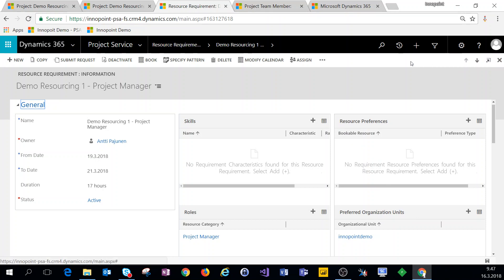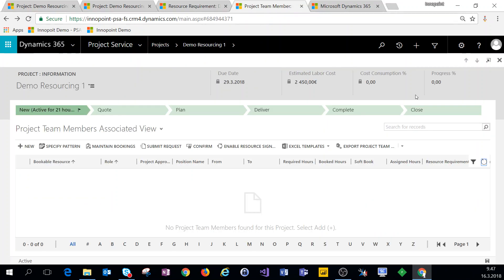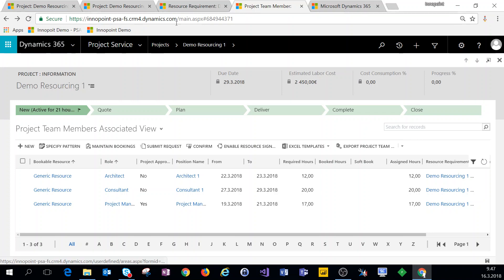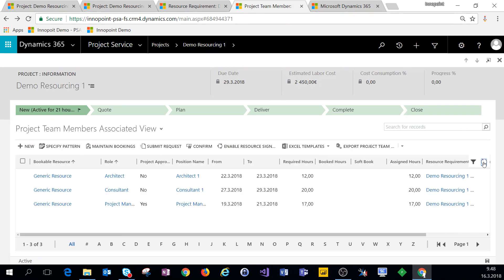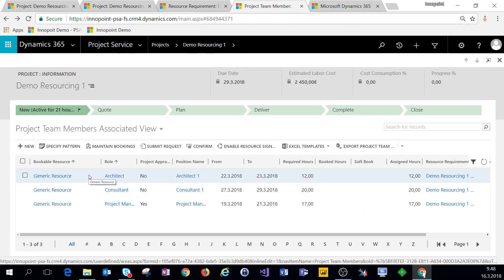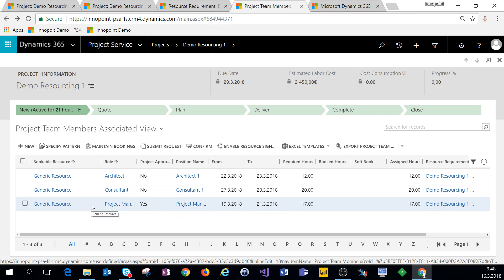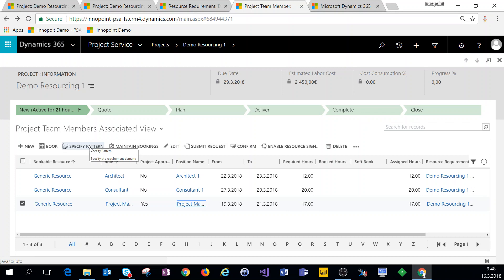Jumping over to project team members, we can see that when we clicked on 'Generate Project Team' we got generic resources as project team members. These aren't actual people — they are generic resources that represent what has to be booked for each task. We'll next be booking actual users or bookable resources for these tasks to replace the generic ones.